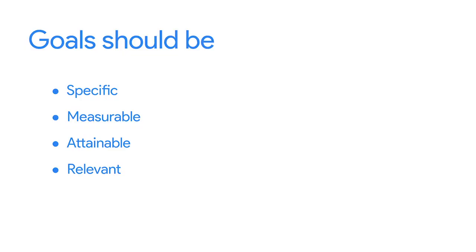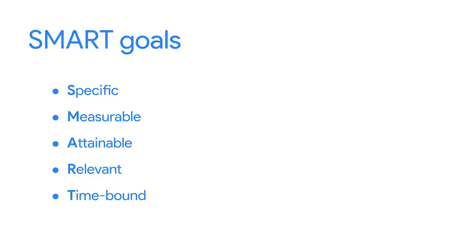And the last part of the SMART framework is to make your goal time-bound. You'll want to add a deadline to your goal so that you know when it's supposed to be completed. Okay, let's review. SMART stands for specific, measurable, attainable, relevant, and time-bound. If your goals are SMART, you can feel confident about including them in your project charter.